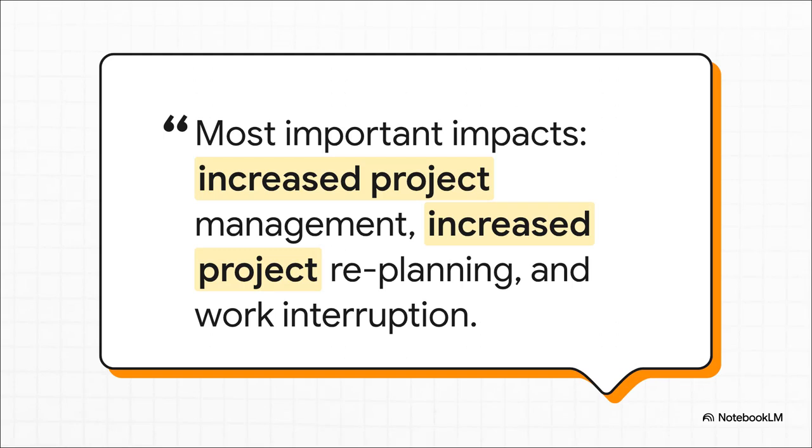And what's really fascinating is what this 2020 study tells us. It shows that the cost isn't just about the change itself. No, it's about the chaos that follows. We're talking endless replanning, extra hours for the managers, the soul-crushing work of demolishing something you just built, and that stop-and-start workflow that just kills efficiency. It can even mess with getting paid on time.